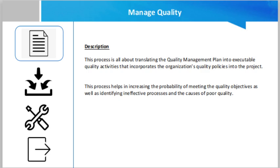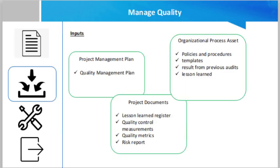Now talking about the inputs for this process: the first input is the Project Management Plan. The component of the project management plan that is an input for this process is the Quality Management Plan, which is the output of the Plan Quality Management process. In the Quality Management Plan, you find a description of the acceptable levels of project and product quality, how to ensure this level of quality in the deliverables and processes, and what to do with non-conforming products, including what corrective actions to implement.